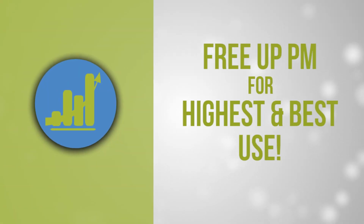It's very hard to expect a project manager to see that as their core duty. It's never going to be. That's not what they do all day long. I think the investment of bringing in somebody to manage the receivable process and free your project managers up to their highest and best use is a really good use of firm resources. And have that project manager as an escalation in the collection policy. So not the first person that we talk to about getting paid, but the second, project manager to project manager, hey, we got a problem. Don't bring them in until later. Let them focus on doing what they do best.